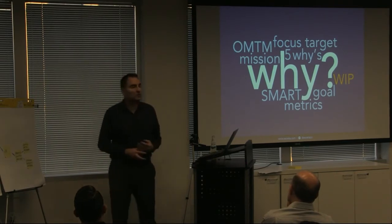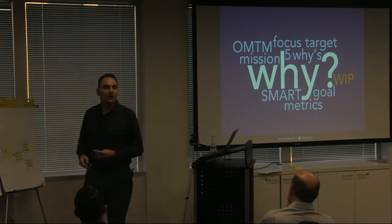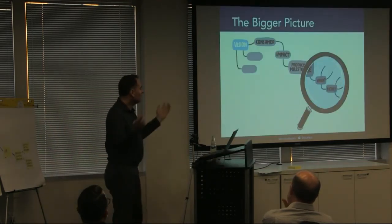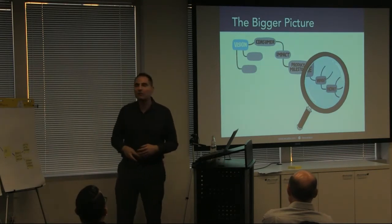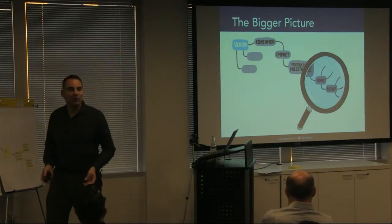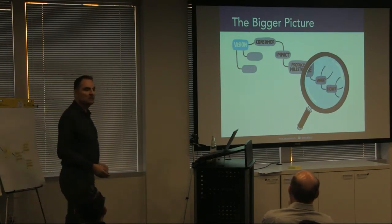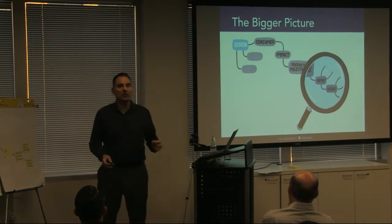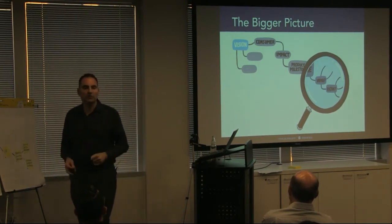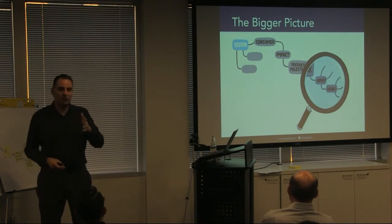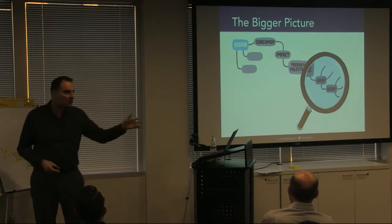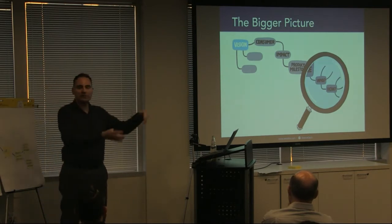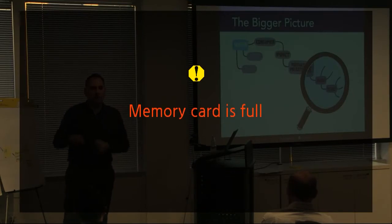These goals are more at a milestone level, so how do we keep track of the bigger picture? One approach is to use two levels of maps. The higher-level map starts with the overall vision, then we break that down — by sequential life cycle phases or by customer segments. Different groups can all contribute to this goal, and we address one after the other.